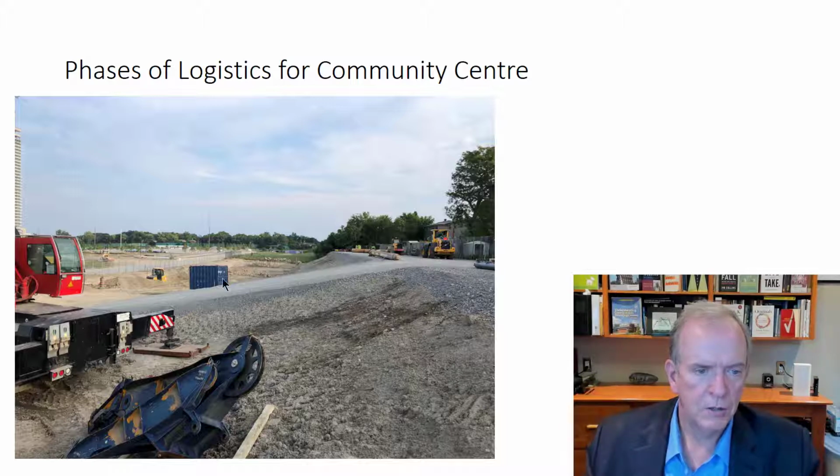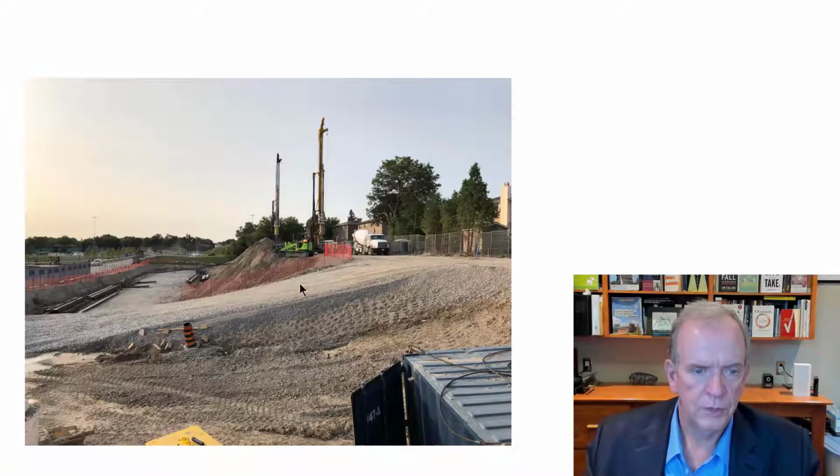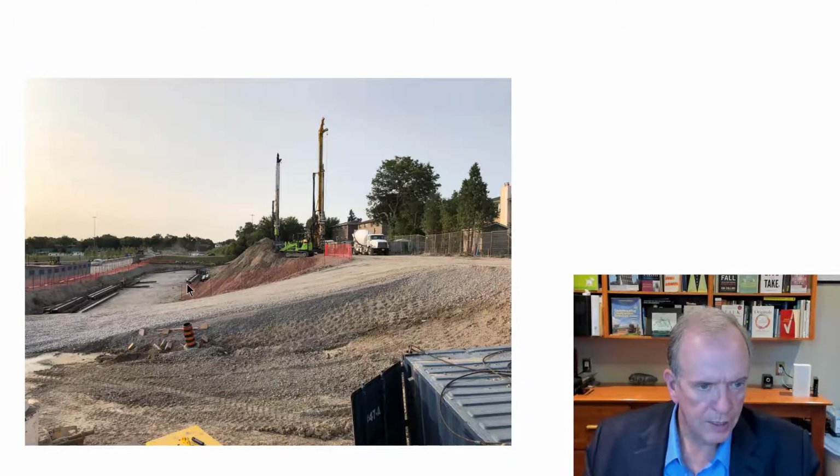And because this is all going to be excavated pretty deep in the future, you need to have the pilings, because up here the backyards are pretty high, since the ground sloped off a hill before. So you have to support that because otherwise it would collapse all these houses' backyards, right? And could even do worse damage. So basically the pilings came in, the ramp goes up, you've got your concrete truck in place here. So the site is laid out, you've got temporary fencing along here.